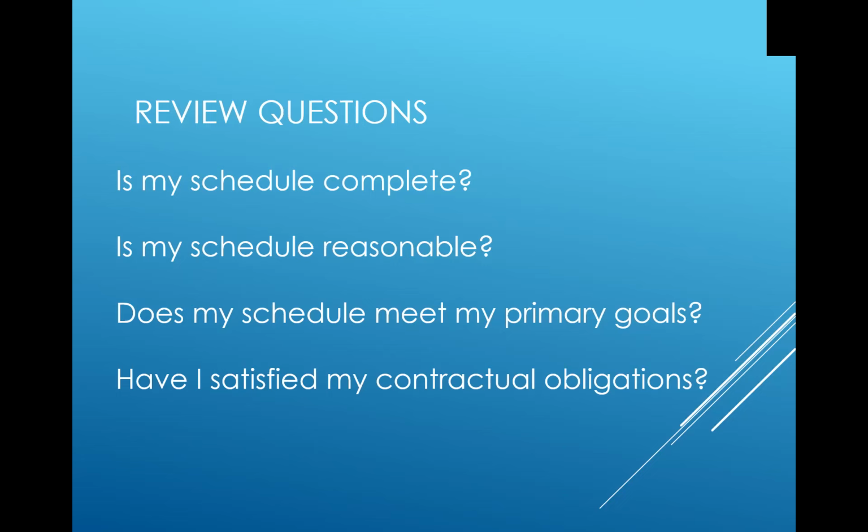Have I satisfied my contractual obligations? Super important to make sure that everything that your client has asked for is in your schedule, including the open date, or the occupancy date for that structure. Any special requests that they have, if they've got specialty items, flooring, marbles, things like that, you need to make sure that you've captured your lead time to get those materials into your schedule.